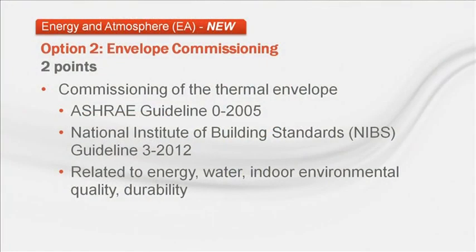The thought process was that a properly constructed envelope will be in place for the life of the building. Proper design, construction, and installation therefore greatly affect energy and water use, as well as IAQ for that same time period. So since envelope commissioning is not generally performed today, when performed in accordance with the requirements shown on the slide, substantial credit is given.